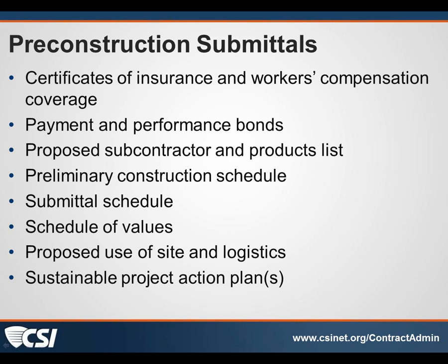And Mitch Miller asked, are the insurance certificates considered as informational submittals with no action required? And I would say that yes, we do not stamp them approved, make corrections noted. We take them for information. I think we should look at them. If there's a problem with them, we should send them back and tell the contractor what the problem is. And they are informational submittals that we review for information only, basically.